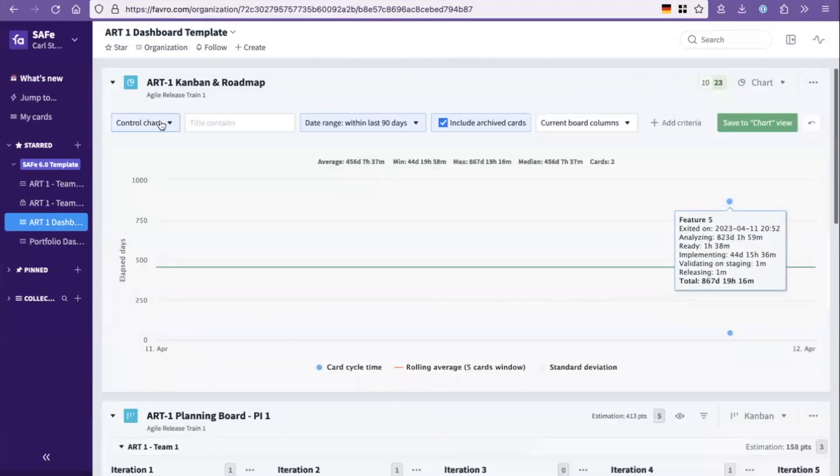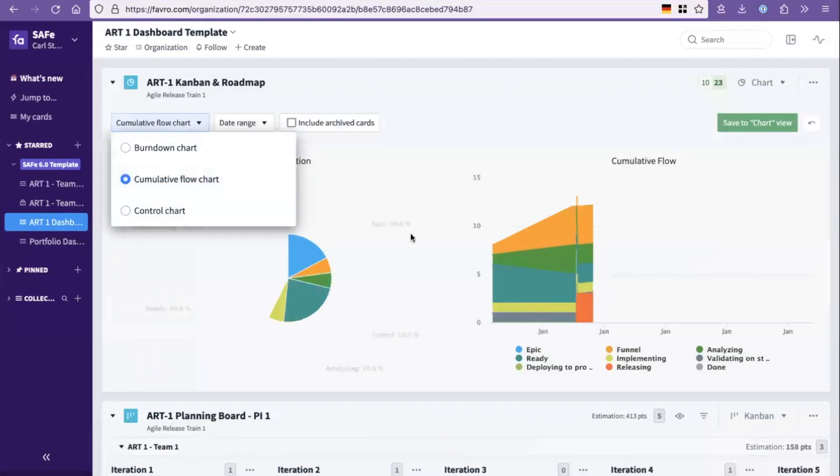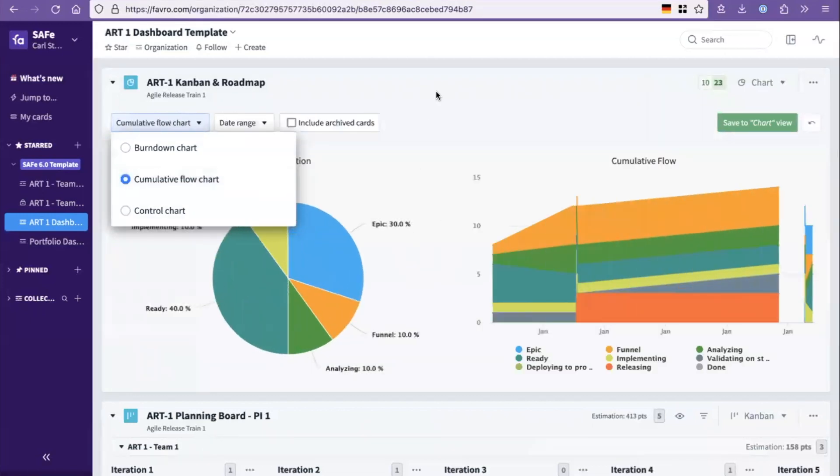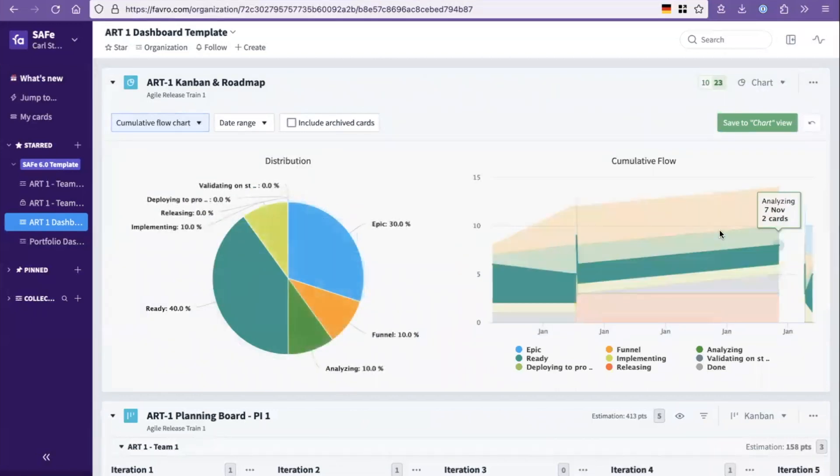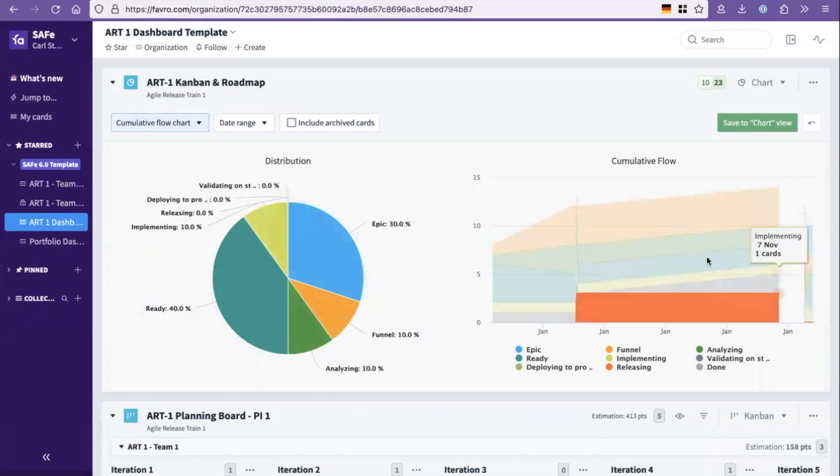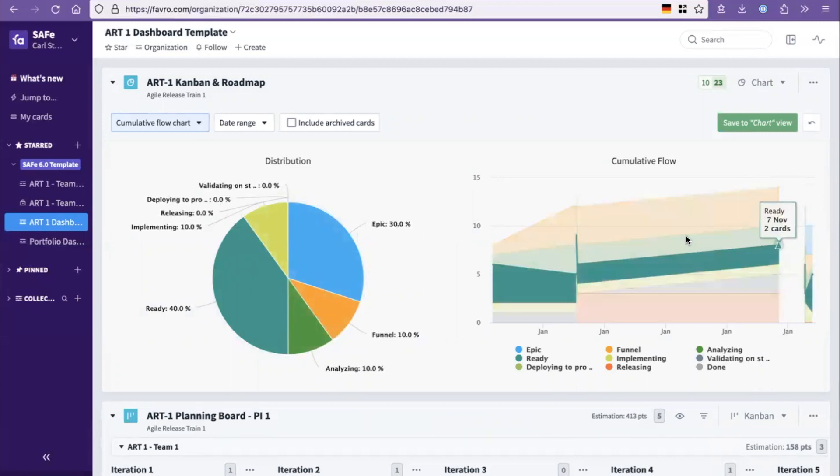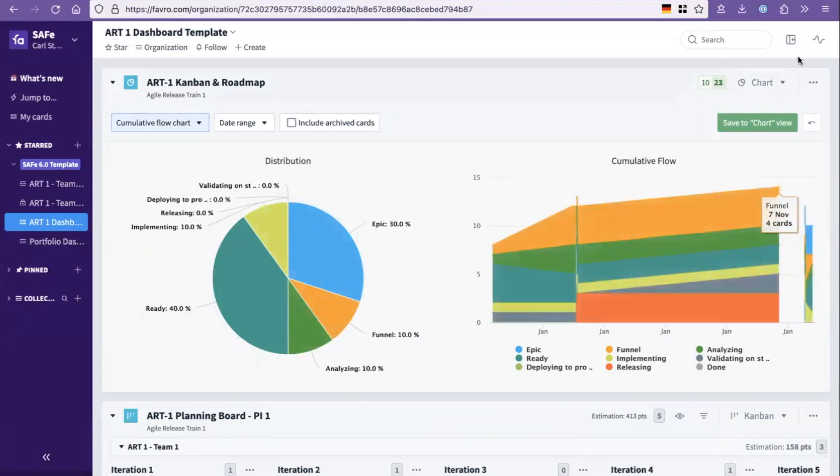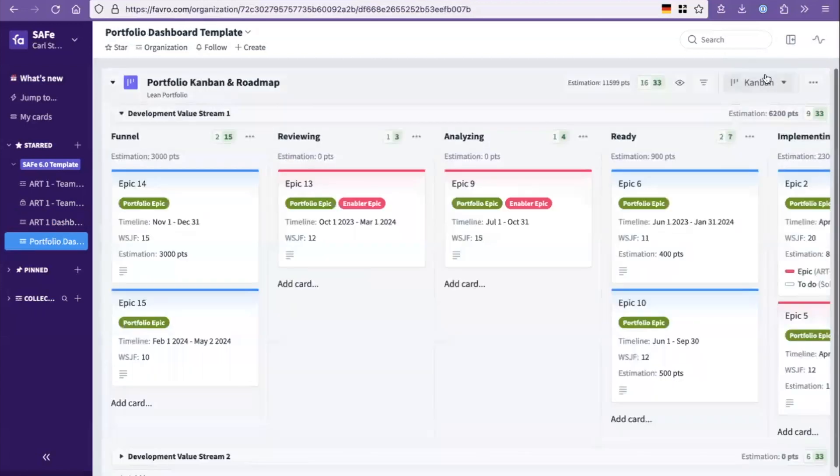Which provides control charts for lead time and flow time in SAFe, and also the cumulative flow chart, the CFD, that gives you a view on how things are queuing up and how much width is going on in each state over time. And this is the same for the portfolio board.